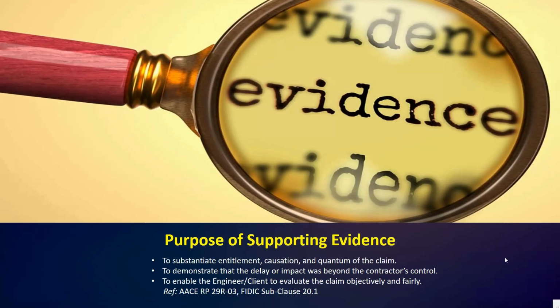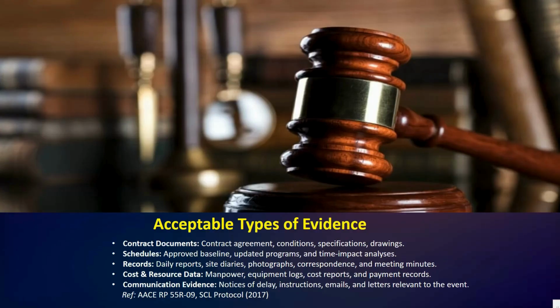Here you can see I have added the reference as per the AACE Recommended Practice 29R-03 and FIDIC subclause 20.1. The contractor must provide proper evidence when submitting a claim. So I hope this is clear.